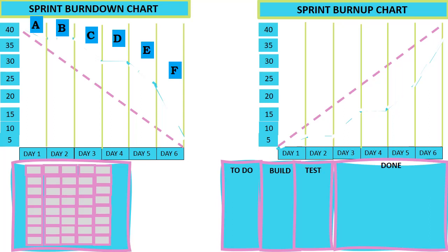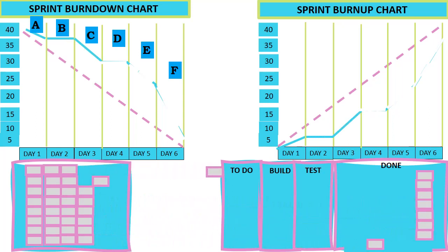project completion. As the product owner refines the stories remaining, and as the team refines its estimates, the project estimate could go up or down, but the team can provide an estimate. If the team averages a cycle time of 4 days per story, and there are 20 remaining stories, the team would have 80 business days remaining, approximately 3 months. As an example, if the team averages 30 story points per iteration, and the team estimates there are about another 330 points remaining, the team estimates it has about 11 iterations remaining.